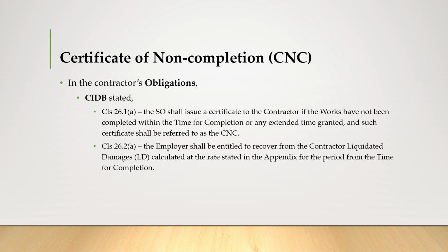And in CIDB, the contractor obligation is stated in clause 26.1a. The SO shall issue the certificate to the contractor if the works have not been completed within the time of completion or any extended time granted, and such certificate shall be referred to as the CNC. In clause 26.2a, the employer shall be entitled to recover from the contractor LD calculated at the rate stated in the appendix for the period from the time of completion.